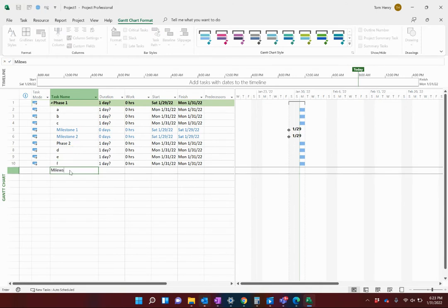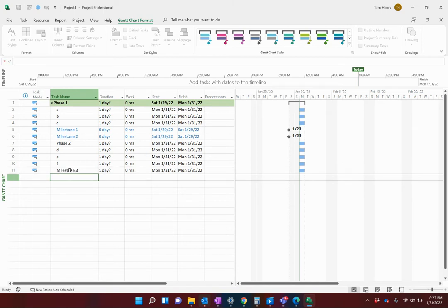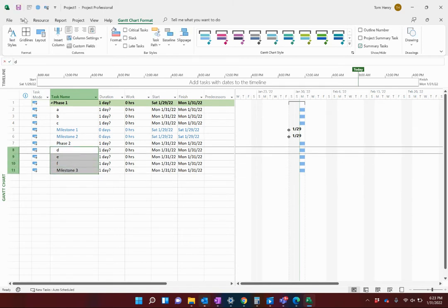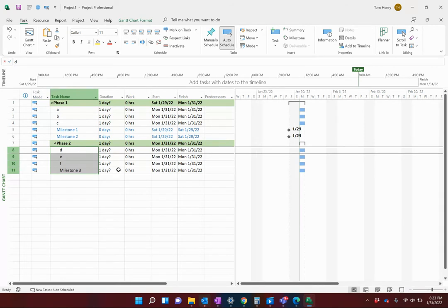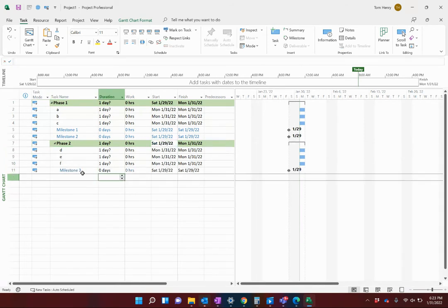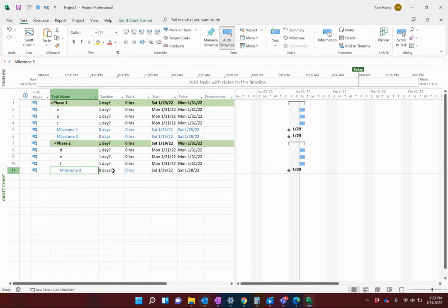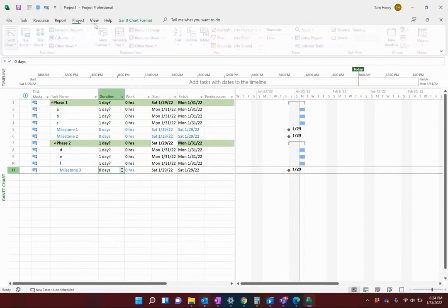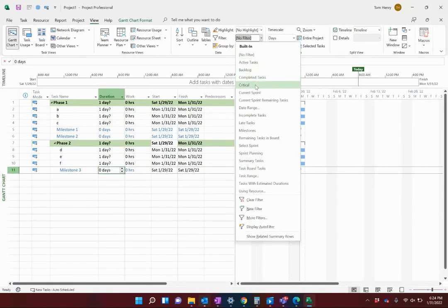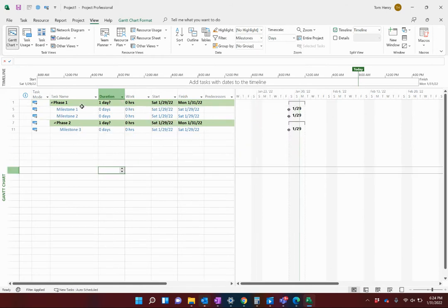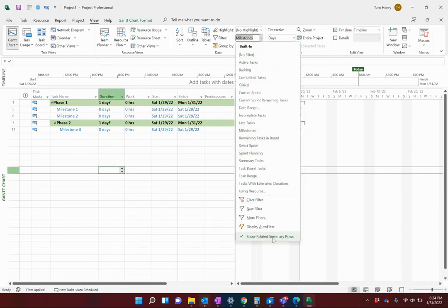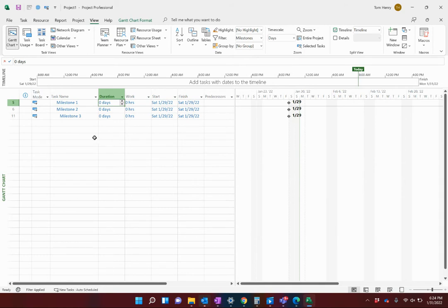As I put some tasks beneath it and indent them, Phase Two becomes a milestone at zero days, and there we go — it is now light blue because I gave it zero days. So however you want your view to be, you can create filters. If I filter and say just show me milestones, it'll just show the milestones. I can also get rid of summary tasks by unchecking 'Show related summary tasks' — this becomes a milestone-only view for the entire organization.